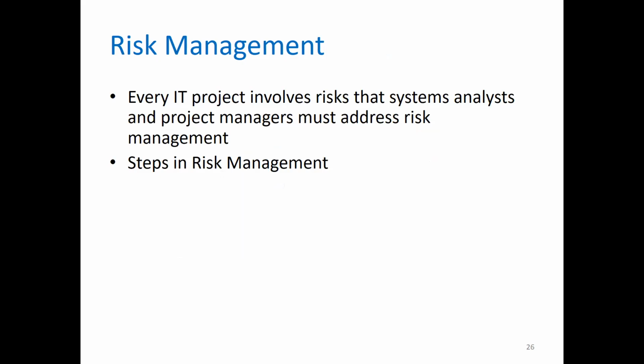Risk management. Every IT project involves risks that systems analysts and project managers must address through risk management. Steps in risk management. Some common steps may include: develop a risk management plan, identify the risks, analyze the risks, create a risk response plan, and monitor risks.